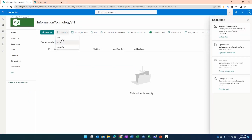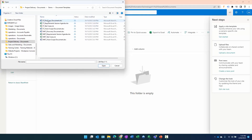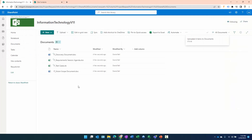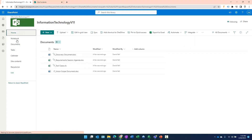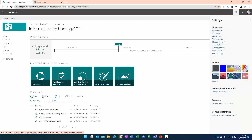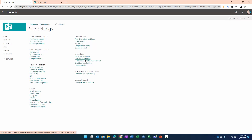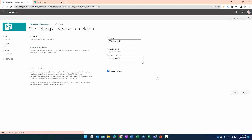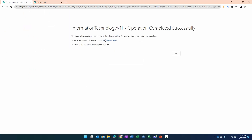We click on Documents, click Upload, and select our IT project document templates. There they are. That takes care of the changes — all we wanted was to create a project site with these project artifacts in it. Now we go to Site Settings > Save Site as Template, and we'll call this 'IT Template v12', including the content, and click OK.